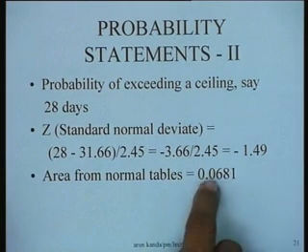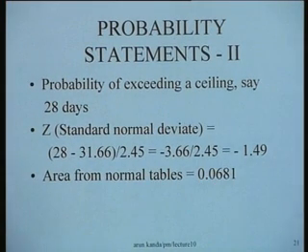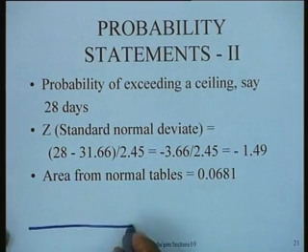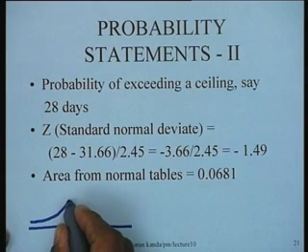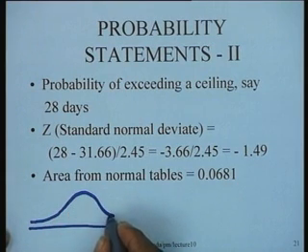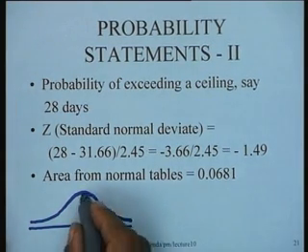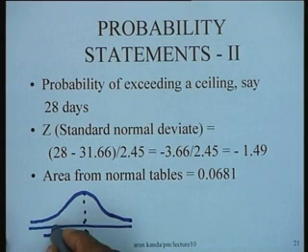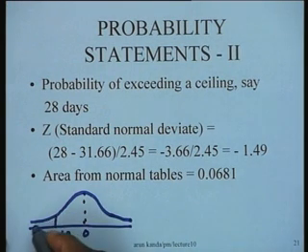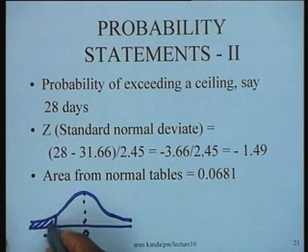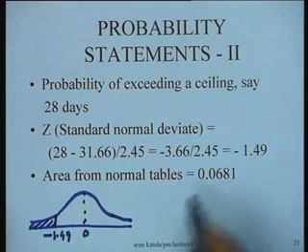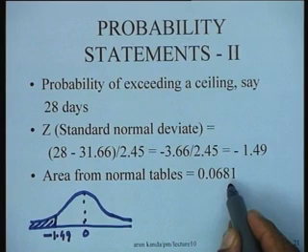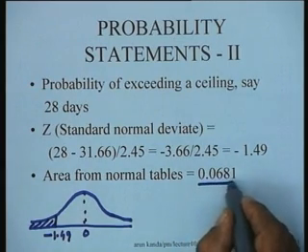And then you look up the tables. Let's see the interpretation of this particular value on the normal curve. What we have in this particular situation is a standard normal distribution, and this is the 0 value, and minus 1.49 would be somewhere here. We are actually looking for this area to the left of minus 1.49, which is barely 6%, 6.81% of the entire area.